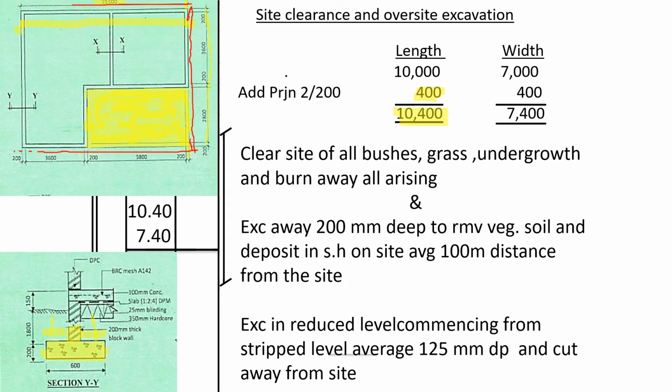This is where the foundation trench shall cover, up to there. The red line is the foundation spread all around the building, because we have the wall. Now the spread will be 200, and that spread, we have said it's from here, the external part of the wall, to here. You see, we have to excavate even this side, because we need to do this concrete below here. So I hope that is understood.